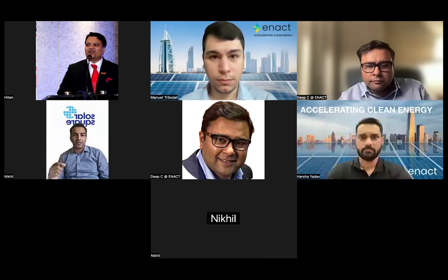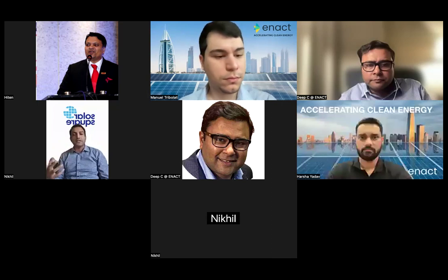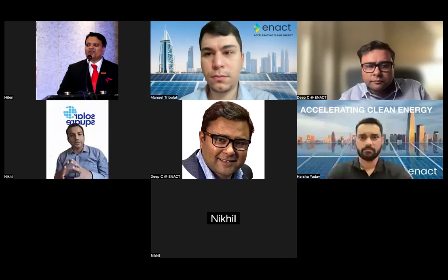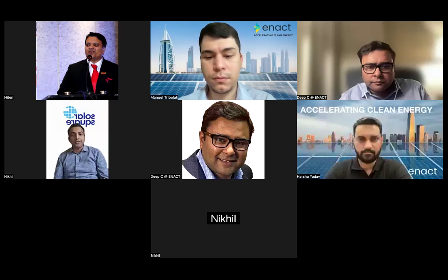And with the processes that we have established at SolarSquare, there are two surveys. One is a pre-sales survey, whether it happens virtually or physically, depending on the complexity of the site and the shadow objects at the site location. We try to avoid these visits to the extent possible, because the volume of proposals that we need to handle is fairly large. So we try to see that these scenes can be created virtually. But if it's a complex site and that necessitates engineering members or technicians visiting the site, then of course we ensure that visit happens.